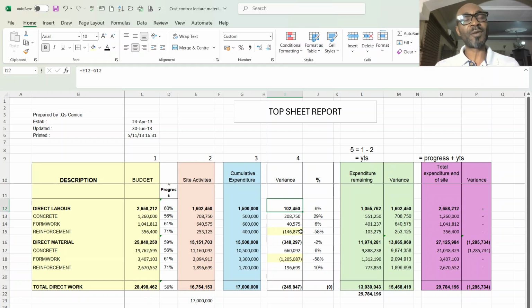You see that maybe you have too many staff on site doing the small job. So that tells you that you needed to reduce your workers to keep within budget and still insist that the reduced workers achieve the progress that you needed, if you are paying them daily. But if it is based on contract, it could be that the price has changed because you couldn't negotiate with them.